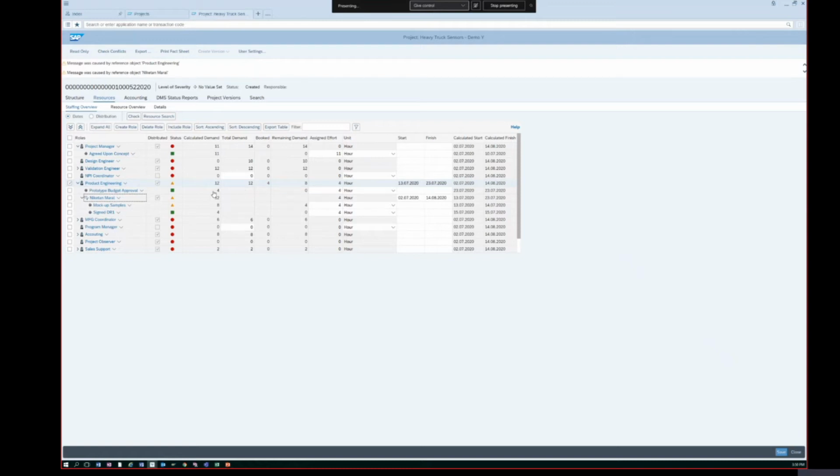And then there is one task which is assigned to my role, which is not really assigned to any user. So we'll keep it for now. And mockup samples does need 8 hours, but right now it's only assigned for 4 hours to a user. So that's why the assigned number is 4. So we have a remaining demand of 4. I'm just keeping this information as an example.